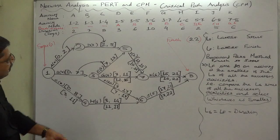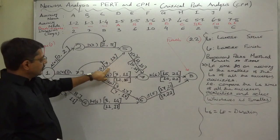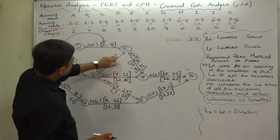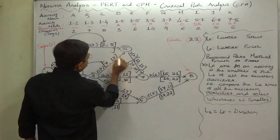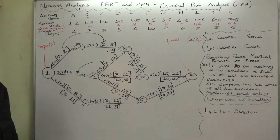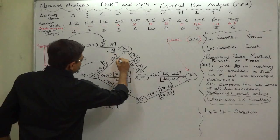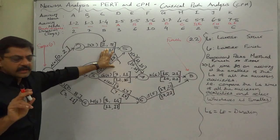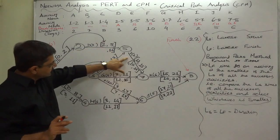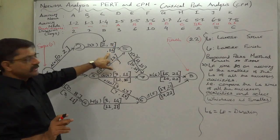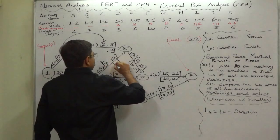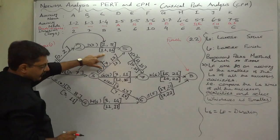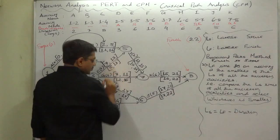I has two predecessors D and E, but both have only one successor, so there is no confusion. I's latest start time of 14 becomes the latest finish time of both D and E. If any activity has only one successor, the latest start time of the successor becomes the latest finish time of that activity. So: 14 minus duration 3 = 11 is the latest allowable start time for D; 14 minus 6 = 8 is the latest allowable start time for E.